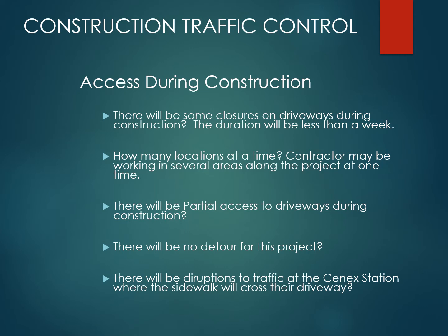The contractor on this project may be working in several areas all at the same time, so they can get different areas ready to pour concrete. So when the concrete shows up, they can move to different areas and get those done in a quick and very timely manner. There will be no detour set up for this project, as we will not block any city streets as part of this project.